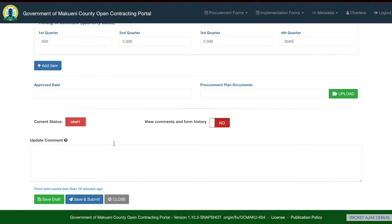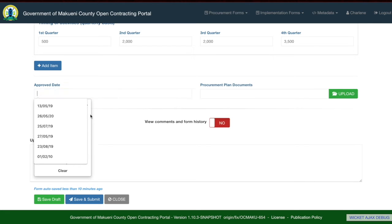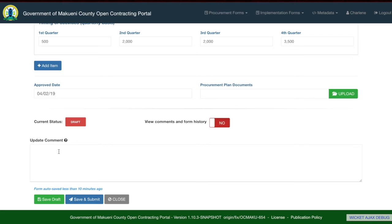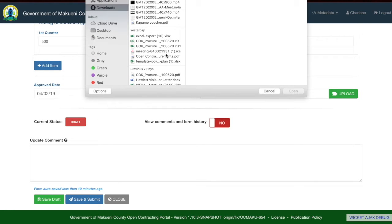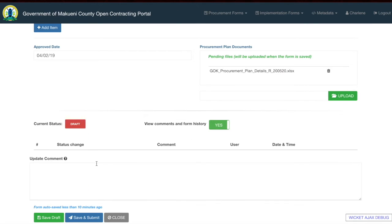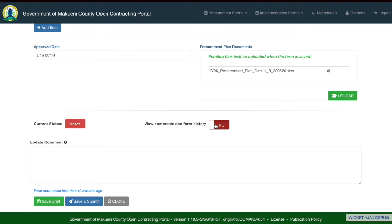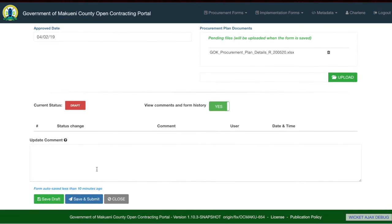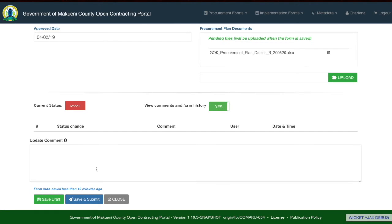Select the target group value and select the value across the different tiers. Continue this process until you have added all items in the procurement plan. Once completed, add an approved date when the procurement plan was approved and upload the procurement document. If you would like to view comments and the different statuses of the form, you can click the toggle from no to yes and you'll be able to see the status changes, comments, which user added comments or changed the status, and the date and time each action was done.